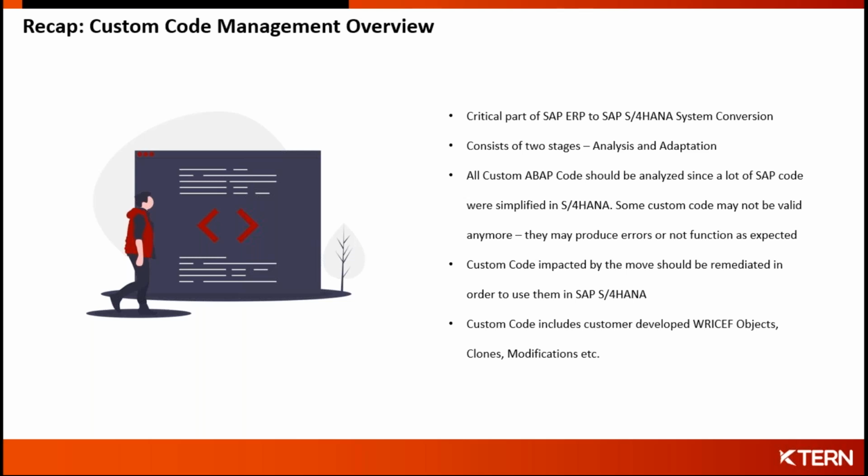This plays a huge role because when the volume of your customizations is high, it can obviously be inferred that your impact could be higher. In those cases, the effort required from the technical team or the ABAP team to remediate them exponentially increases, as well as the test cases or the test executions or the testing that comes with it. So, which is why custom code analysis plays a huge role during your discovery or your assessment phase, so you can probably decide your path to S4HANA.